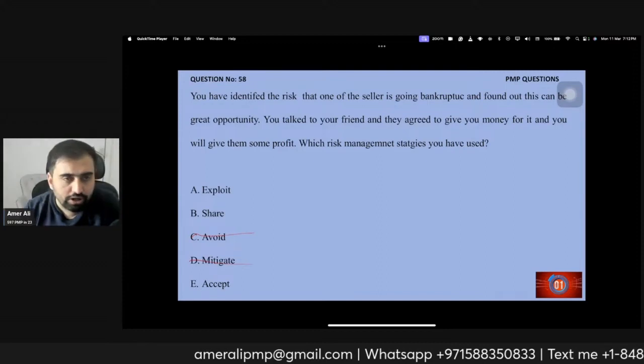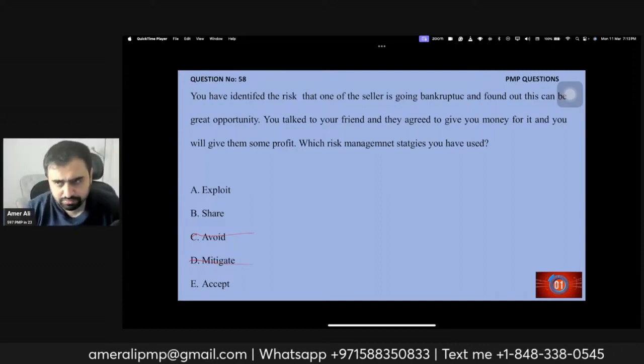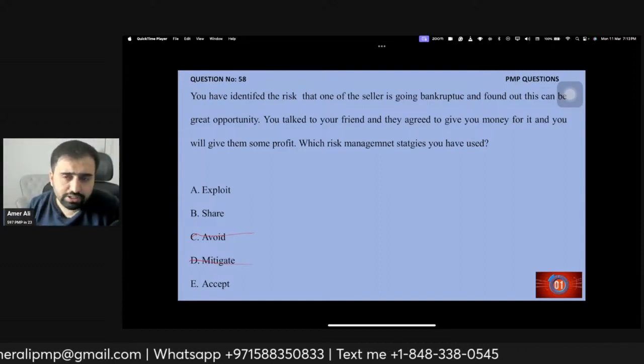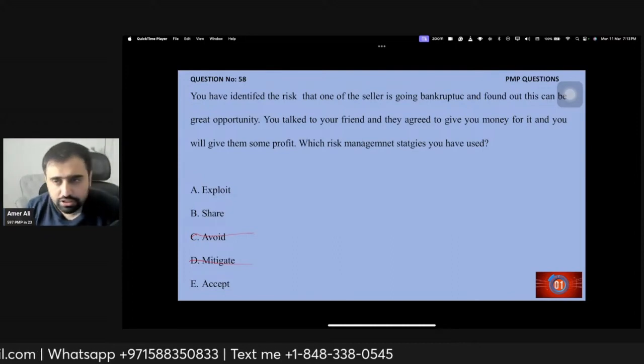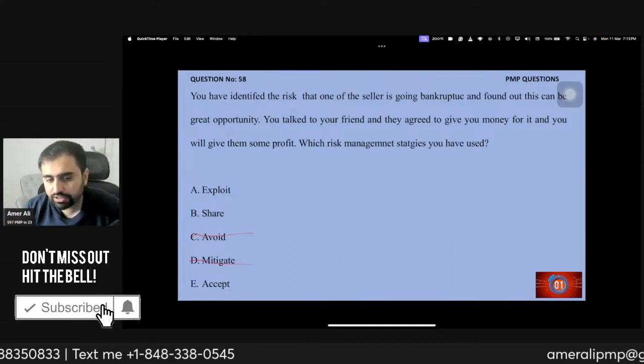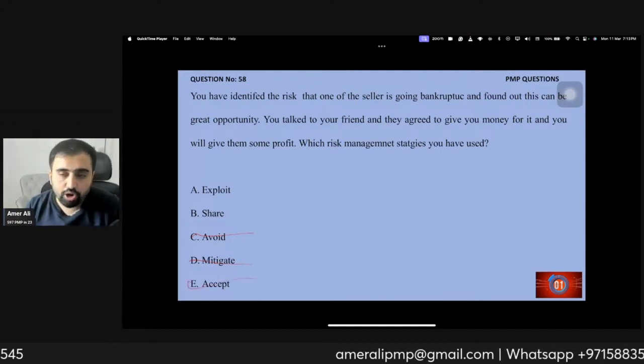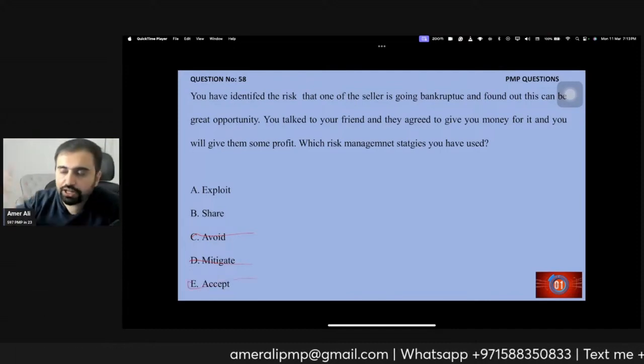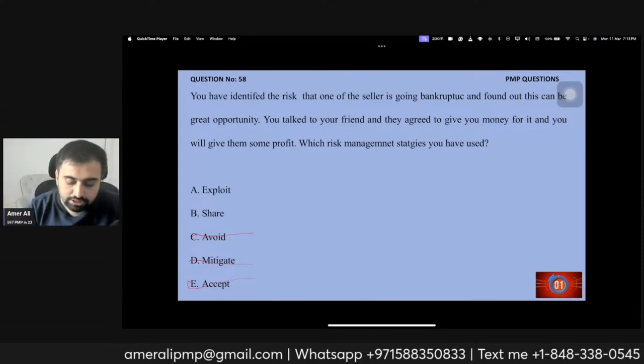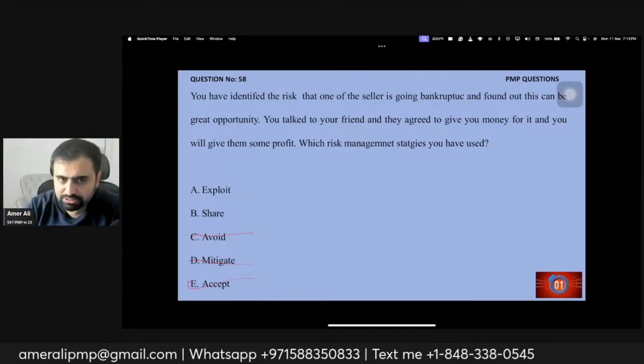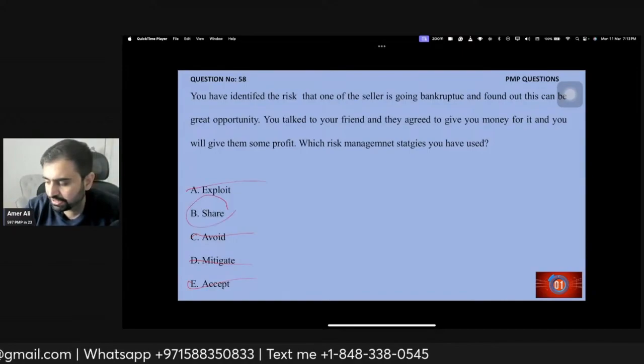Acceptance or active acceptance, that in the matter is when you proactively don't take an action, you wait for the trigger to happen and then you take action. So we did not do that, so it's not acceptance. Exploiting is not like you get something with there. So this is not exploiting. You put the best resources, so share is the right answer.